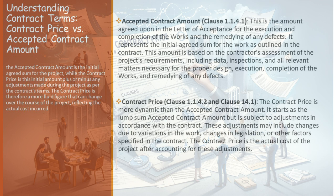One key factor in these adjustments is changes in legislation, as detailed in Clause 13.7. If there's a change in the laws of the country, or in the judicial or official governmental interpretation of such laws, after the base date, which affects the contractor in performing their obligations, the contract price will be adjusted to reflect this.